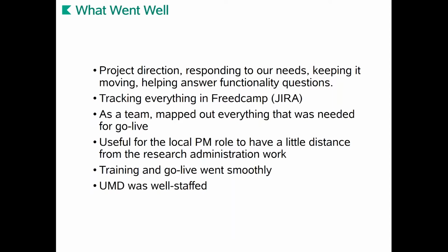One of the things we did, which took some time, is as a team, meaning Kuali and Maryland, we mapped out every single little step, down to, we need to stop the HR feed on Friday at 9 o'clock. We need to take a database backup. And then we tested that, and it takes 3 hours. Then we said, what is the timing of that move? It takes 4 hours to move our copy of the database to Kuali. How long does it take Kuali to load that database? It takes 23 hours to load the database.